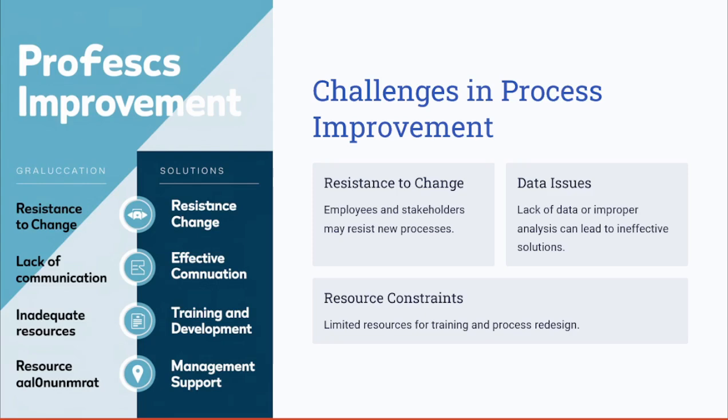Let's take an example here. Say that in a public sector project, resistance to digital transformation can be tackled by, for example, gradual training and phased implementation. So you implement the project in phases, and you ensure that you train your end users on that project to ensure that they adopt these technologies and don't resist change, ensuring a smoother transition.